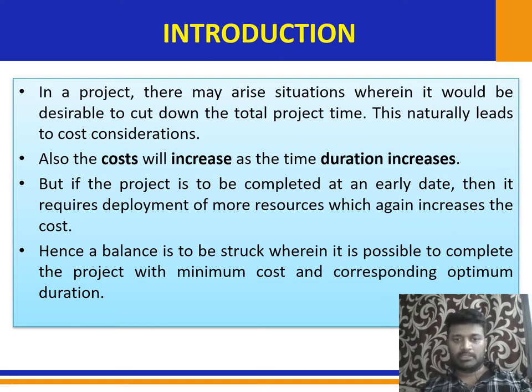So in CPM, the time is related to cost, and our objective is to develop the optimum cost time relationship. Many times it becomes necessary to complete the project earlier than the normal time. In such situations, the cost of expediting the operation or activities has to be considered. The CPM, that is the critical path method, makes use of this cost estimate along with the time estimate and provides a schedule for completing the activities at the minimum total cost.